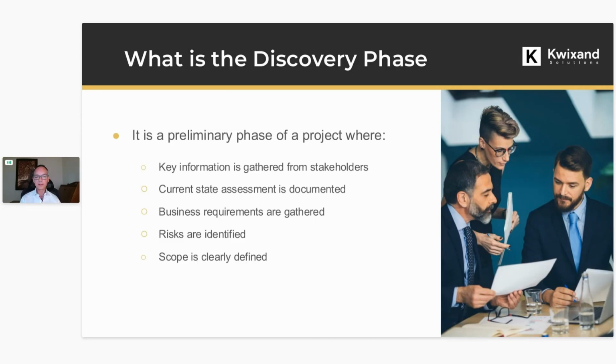We want to identify risks. So are existing systems or software subscriptions expiring near term? That can always put pressure on your budget and timeline. Are data backup and recovery protocols established? Is there something in place that the IT team is doing within the organization that you need to take into consideration? Additionally, is there a disaster recovery plan in place where you can extract the data from a given time or date? Are there any conflicting priorities?